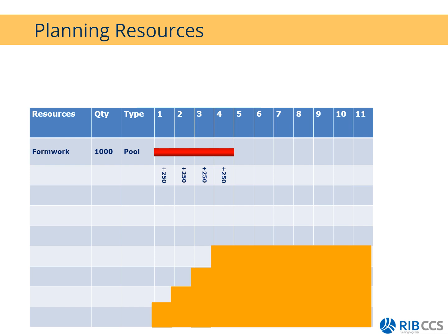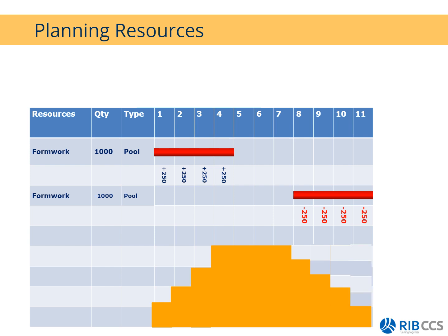So a good example is you set up your rebar, you put up your formwork, you cast your concrete, and then after curing, you strip your concrete. So then you can introduce another activity, call it stripping of formwork. You will allocate a negative quantity next to that specific activity, and depending on the duration, you will remove it accordingly. So that means if you do draw up your histogram, it should be in a step form like this.